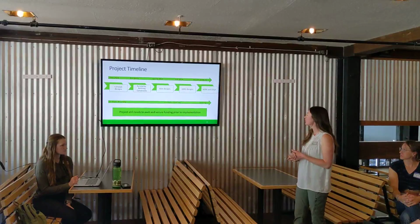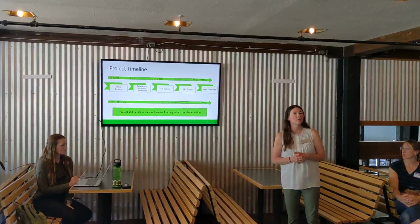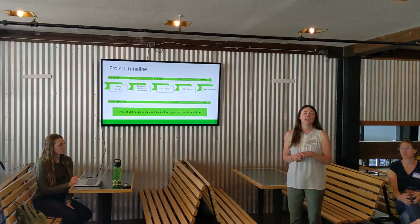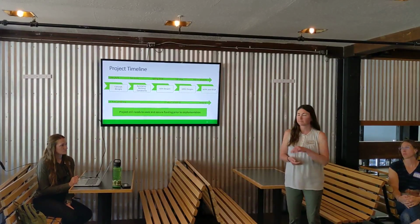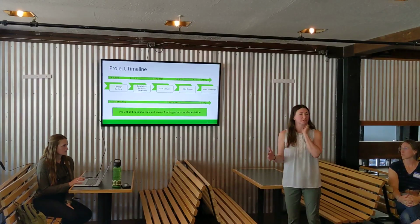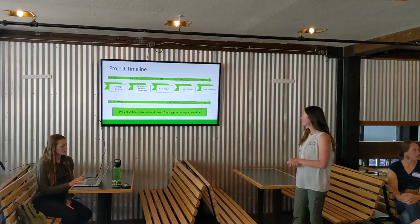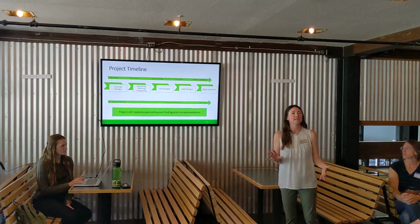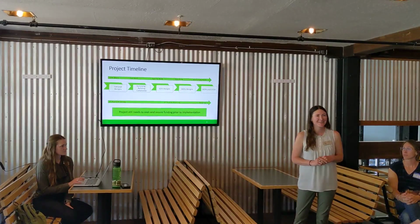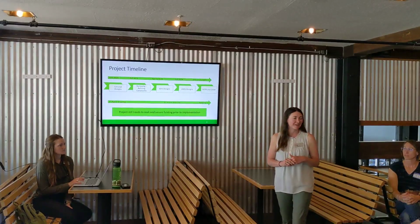So here today we're at our second public meeting. Going forward, we're going to be taking the feedback you give us, working with some other easement landholders like Nevada County and Caltrans, and working toward a final 100% design. NEPA and CEQA are expected in winter 24 into 25. There will be a formal scoping as part of that process. And then just to reiterate, we will still be needing to seek funding to implement this project. So, I wouldn't expect this to be implemented in the next 6 months to 18 months. 2 years is probably realistic, if not more.